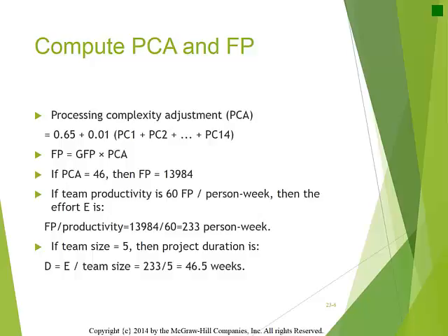If the team size is 5, then the project duration is the effort divided by team size, which equals 233 person weeks divided by 5 persons, having a duration of 46.5 weeks.